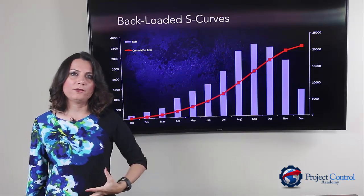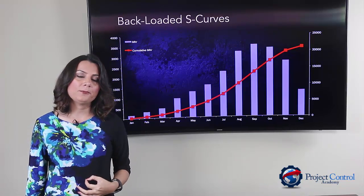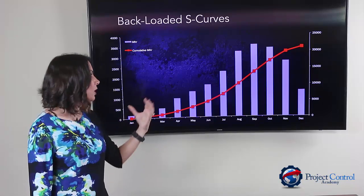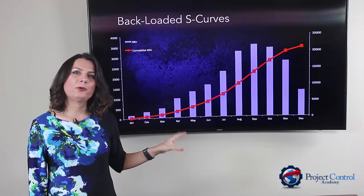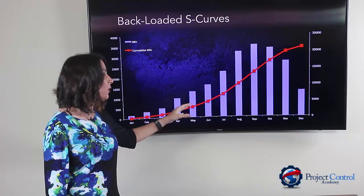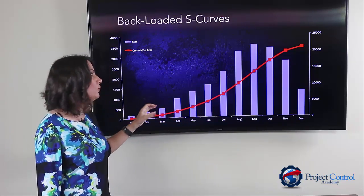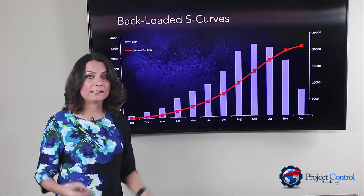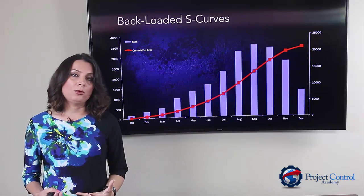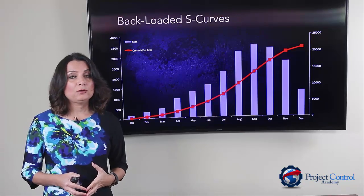Examples of back-loaded S-curves would be complex projects that need a lot of planning and design early on — it takes a lot of learning curve before you jump into execution and start executing the job. That would be an example of a back-loaded S-curve that you may face.